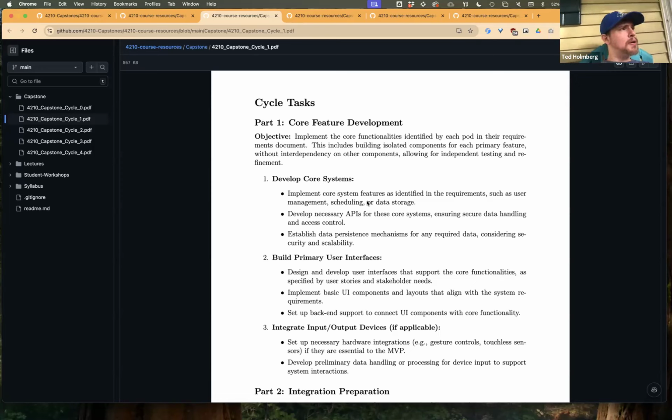For example, suppose that we put a lot of investment into these Leap Motions and we find that the interface system is too noisy or too unreliable to produce a good user experience. If all the stakeholders say the Leap Motion is not a good interface system, this is the instance, very early on during the MVP, that we might want to drop the Leap Motion and look into an alternate input scheme that allows users to interface with our touchless kiosk.